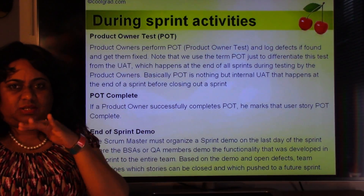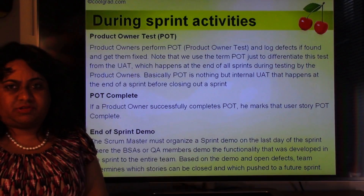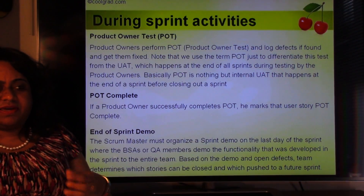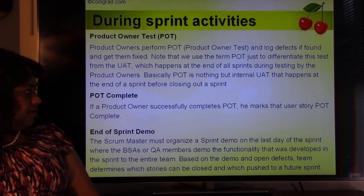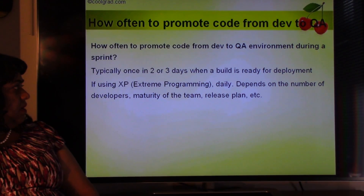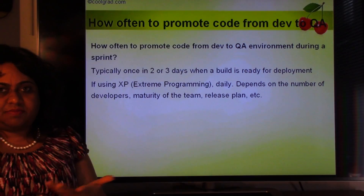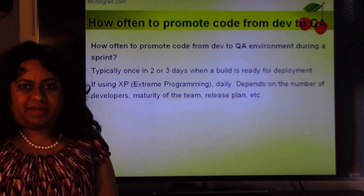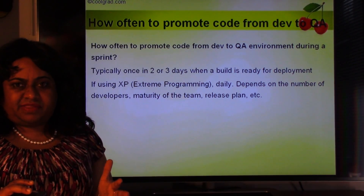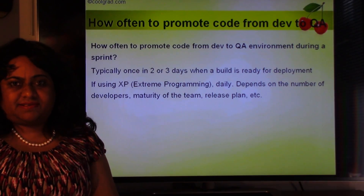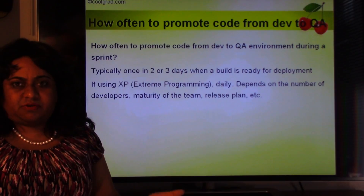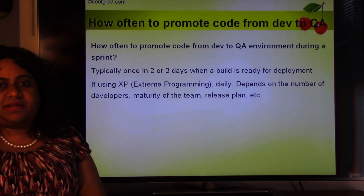The sprint retrospective is also where the team determines the appropriate planned velocity for future sprints. If you picked up 600 hours and could only deliver 400 hours, should you pick up 600 hours next sprint? Better to pick up 500 and deliver 500 — what's important is to get a 100% closure rate. Picking up more than you can deliver and getting disappointed is worse than picking up a realistic amount. The sprint retrospective helps the team evolve in Agile — it can be made interesting with games and team bonding activities.